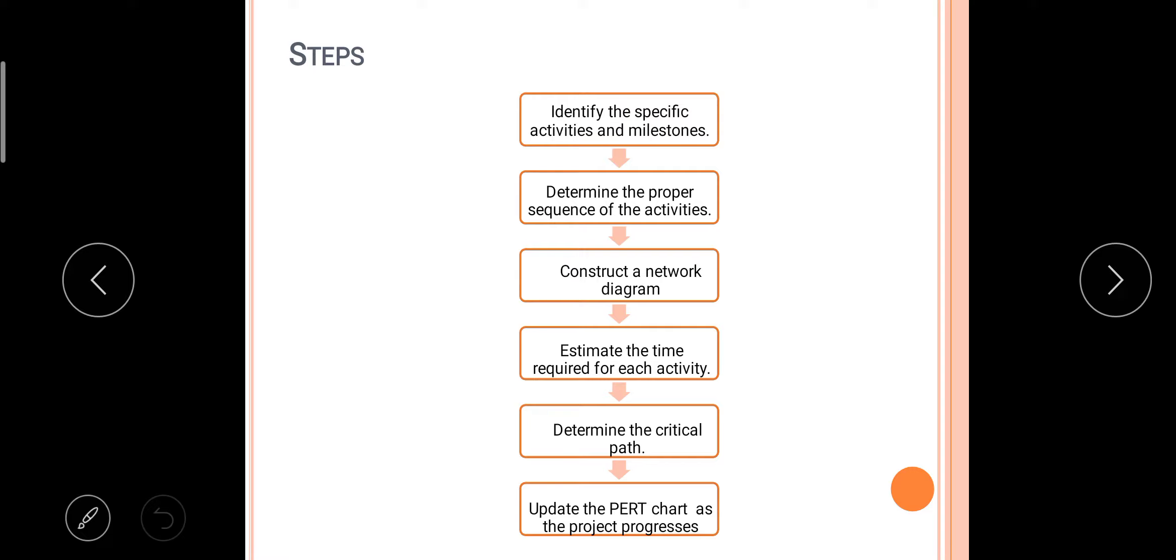Once you have determined, next construct a network diagram. What you have to do is construct a diagram like first you will go here, after that you will reach there. Like this you have to make a diagram and estimate the time required for each activity. Once you have constructed the diagram, you have to allocate time like first step needs two minutes, second step needs two days, next two days, three days, like this you have to give separate timing for small activities.